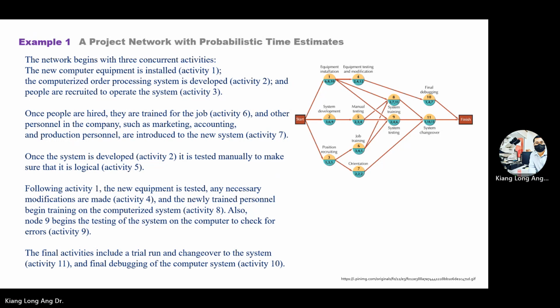Okay. So the rest I won't go deep. At least you already know how to extract data and then form this one. Again, the arrow always goes forward. Don't draw the reverse one. No reverse in the network. And then previously we learned about dummy. AON doesn't have dummy, but they can ask you the definition of what a dummy is. Dummy only appears in AOA. AON doesn't have.